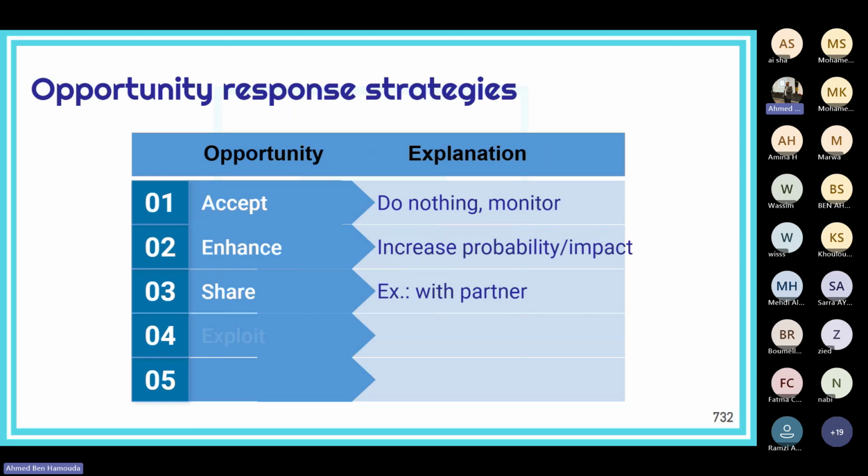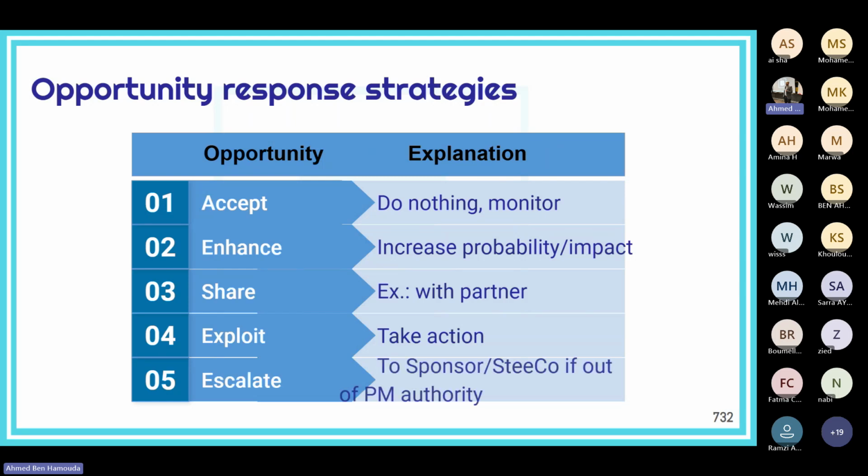As for the opportunities, we also have 5 response strategies. So you could accept to do nothing, just watch the opportunity, monitor it, or you could try to enhance it. Like, for example, taking some actions to increase its probability of occurrence or its potential impact.